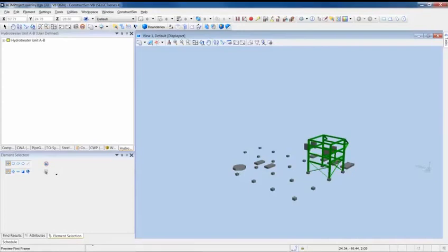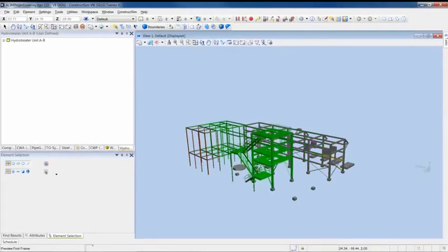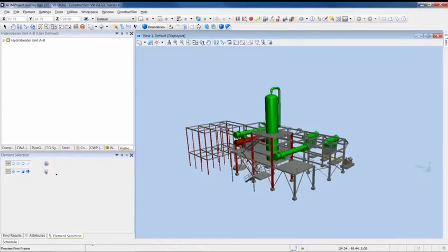As we move forward, we are looking for obvious issues with the construction or installation sequence. And we may have found one. It would appear that this pipe is being installed unsupported and not connected. We will make a note of this and monitor it as we go forward.